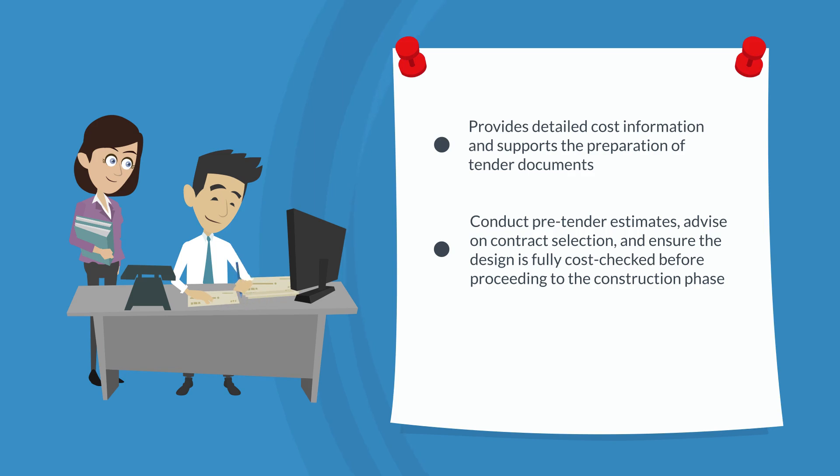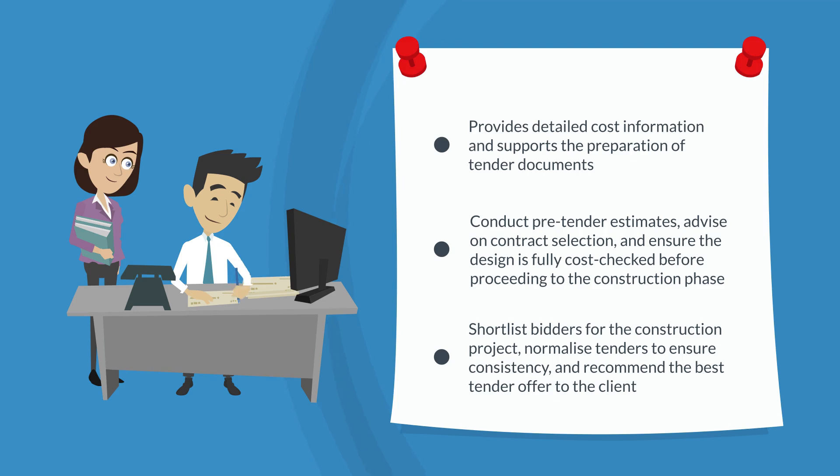If this is a traditional procurement route, the Quantity Surveyor would shortlist bidders for the construction project, normalise tenders to ensure consistency and recommend the best tender offer to the client. They would then negotiate contract terms with the successful tenderer, ensuring terms are fair and balanced.